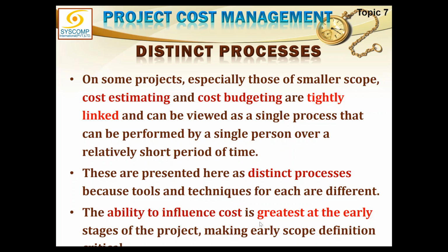The ability to influence cost is greatest at the early stages of the project. We have seen a graph earlier in which we saw that if there are changes early in the life of the project, the impact on cost will be minimal. But the nearer we are to the end of the project, the more likely we are to spend enormous amounts. So we must understand that changes, if possible, should be brought in as soon as possible, as they incur lesser cost.